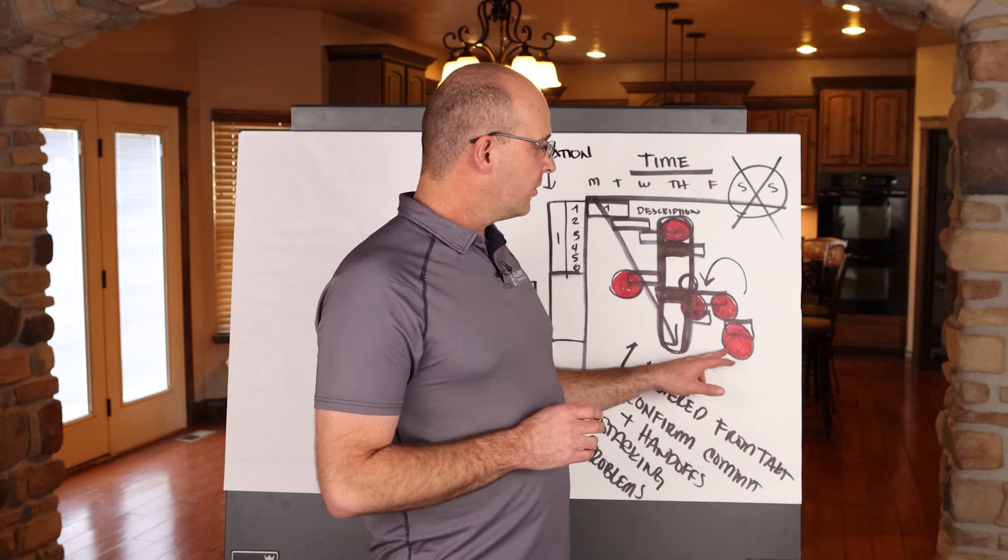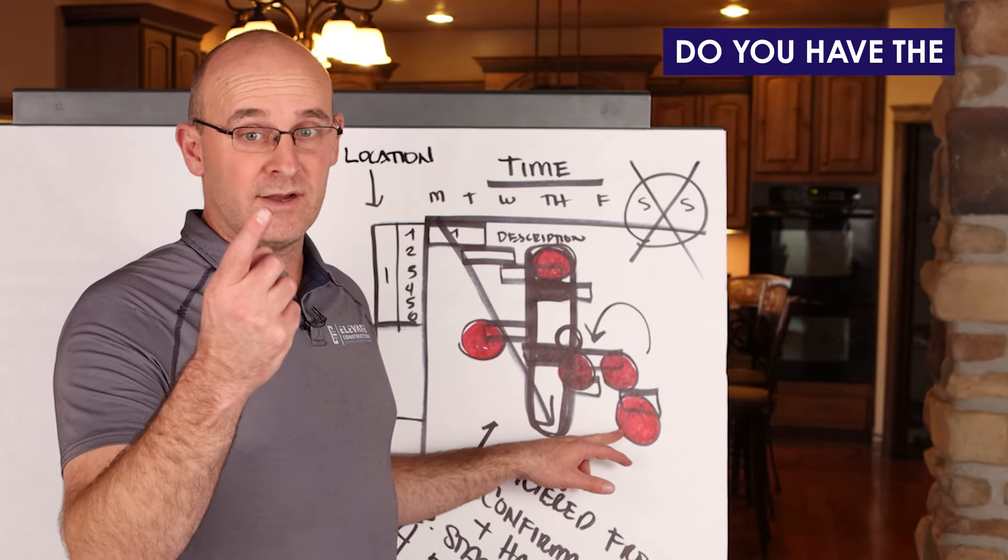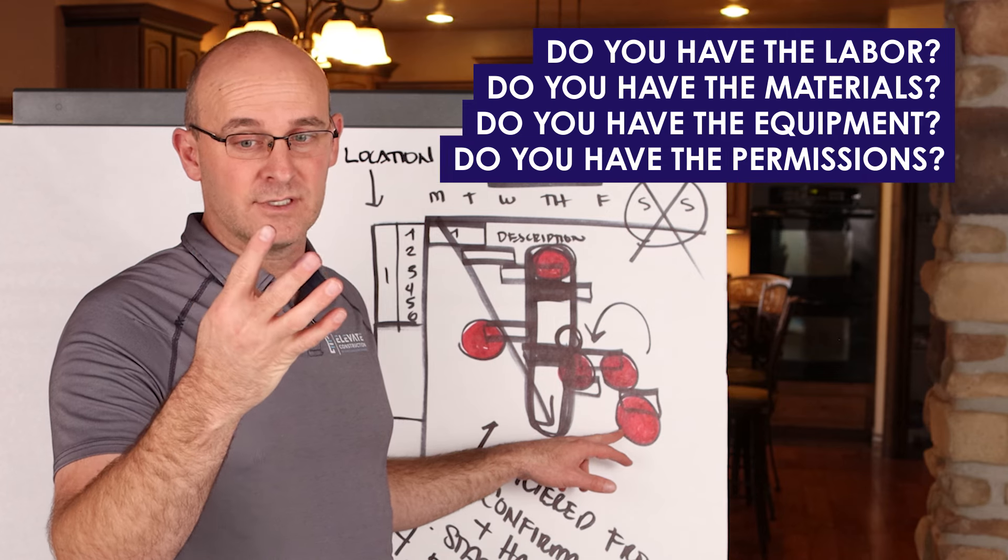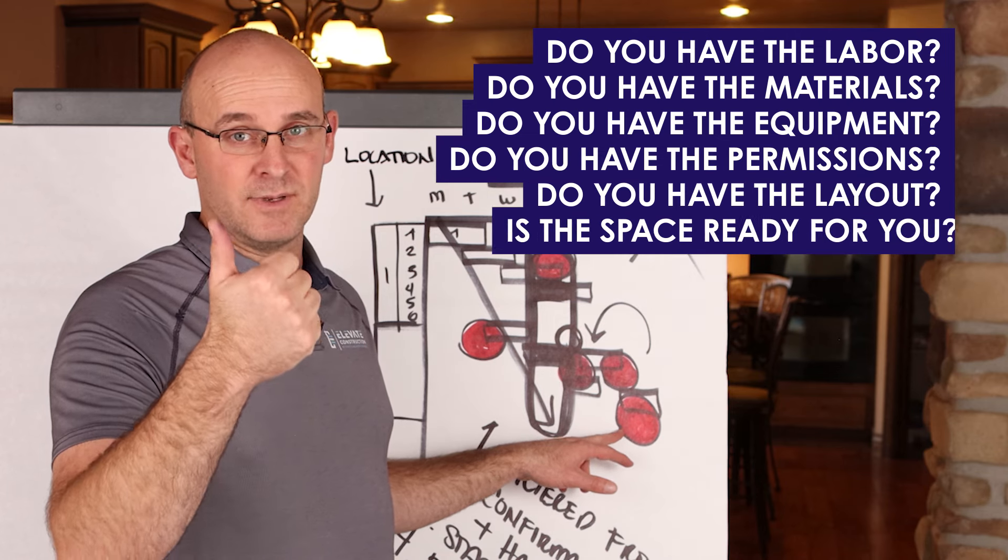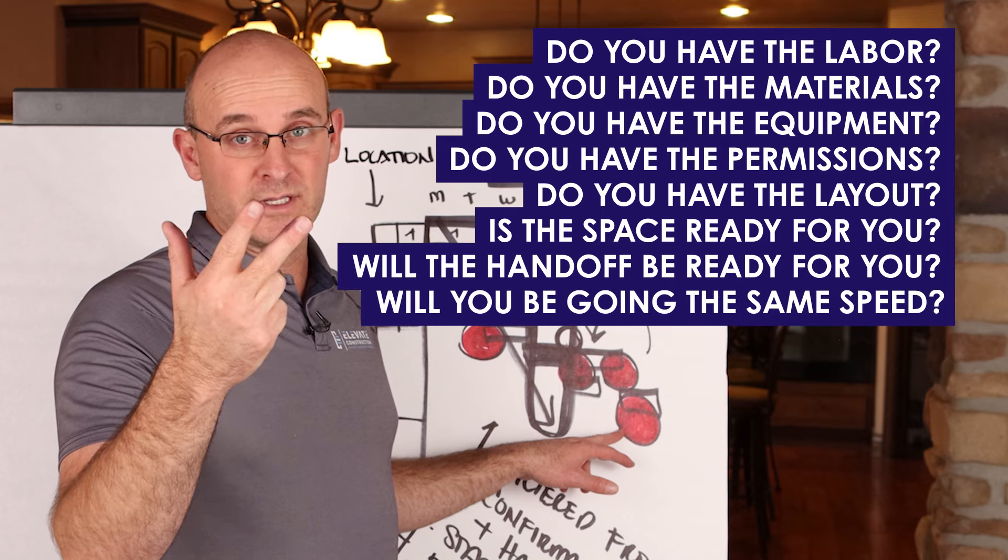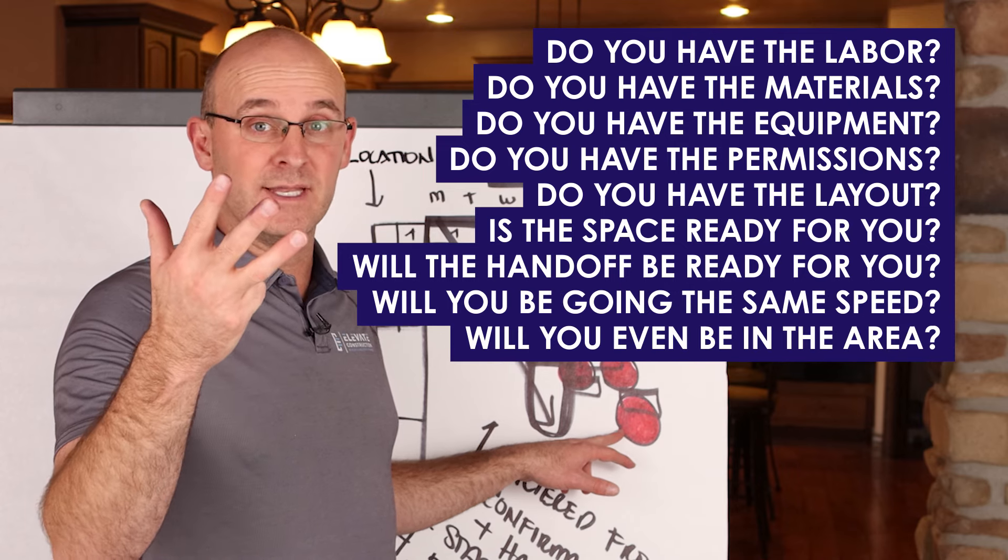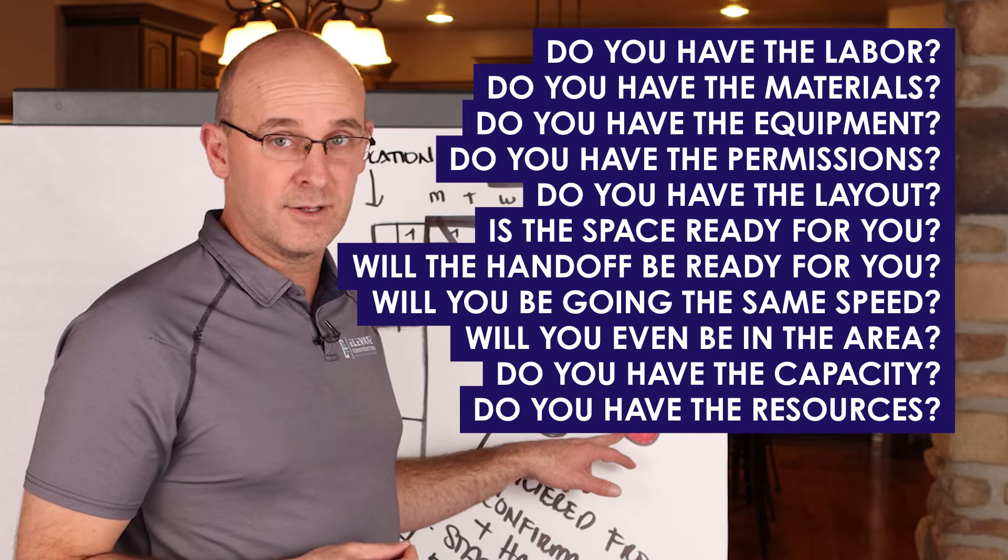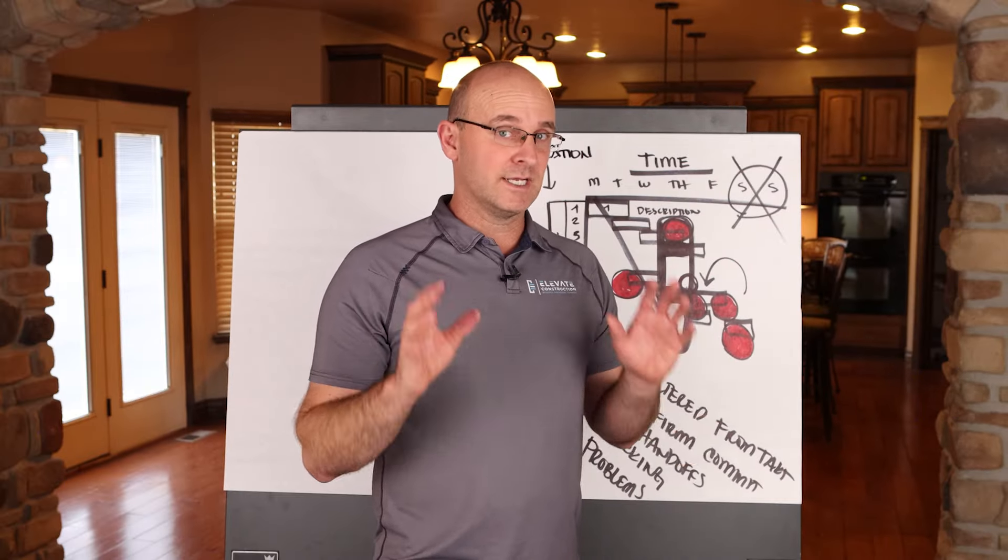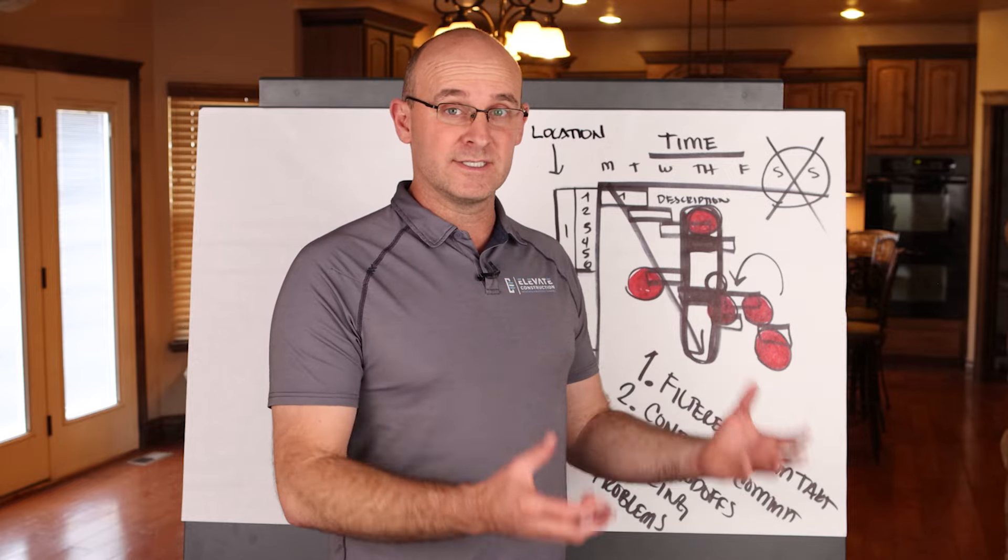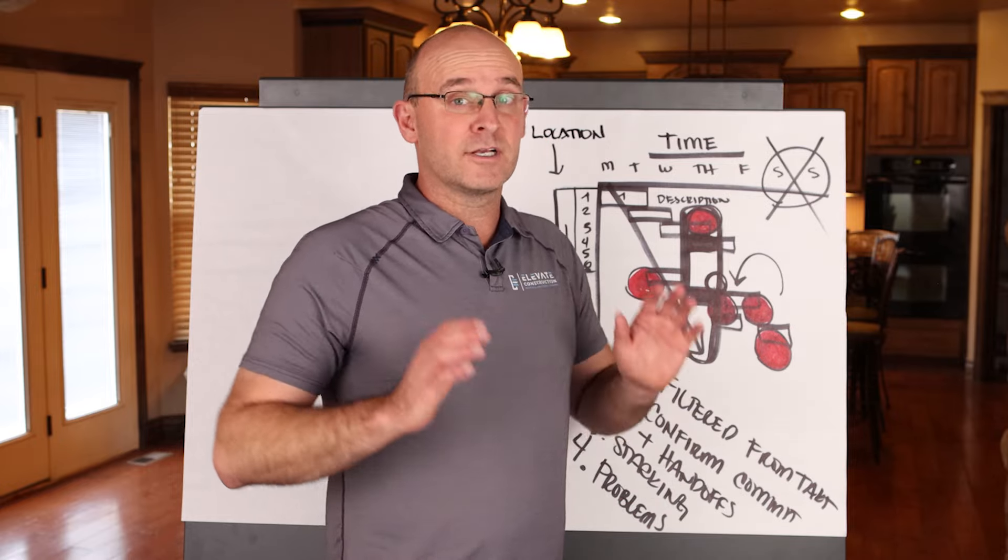When you do that, you're going to give them some parameters. Do you have the labor? Do you have the materials? Do you have the equipment? Do you have the permissions? Do you have the layout? Is the space ready for you? Will the handoff be ready for you? Will you be going the same speed? Will you even be in the area? Do you have the capacity? Do you have the resources to accomplish this? And if you don't, it's a problem. And then problems become roadblocks. Roadblocks become things that we solve. Solved roadblocks become flow.